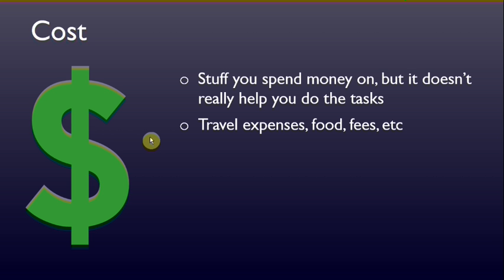So if part of your project involves traveling to a certain location, or maybe flying in a contractor that needs to work on part of the task, that money that you're spending on the plane ticket isn't really helping you with a particular task, but it is part of the overall budget for the project. So we have to account for it somewhere.